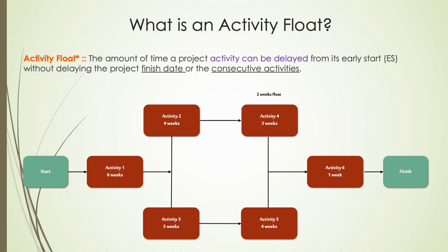Activities on the critical path have zero float, meaning any delay will directly impact the project's end date. Properly applying these techniques ensures efficient resource allocation, anticipates scheduling risks, and helps maintain control over project deadlines. Would you like a sample calculation based on this diagram too?